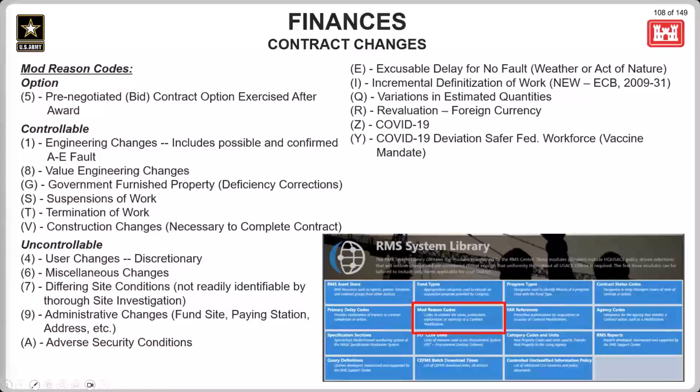It will continue to calculate the original contract required completion date after adding the award duration to the NTP acknowledged actual date. The time impact associated with the change request when executed will be added to the current duration and will be shown as time growth on the project when viewing or printing reports.